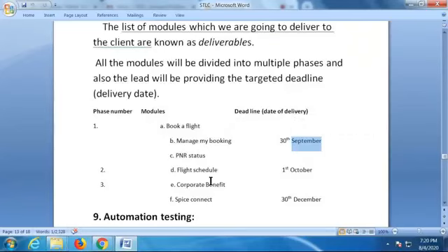Before assigning tasks to any tester, he'll consider the tester's performance and experience, how much experience you have on that domain. Based on your performance and experience, the leader will know who can work on what. Based on that, he will schedule the tasks for everybody. According to the schedules, you have to go and write test cases for those modules. That's what I'm telling you guys.